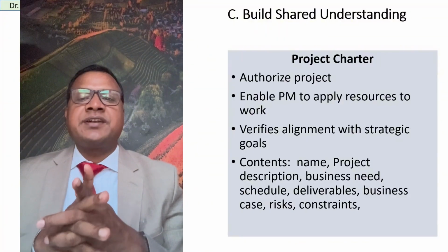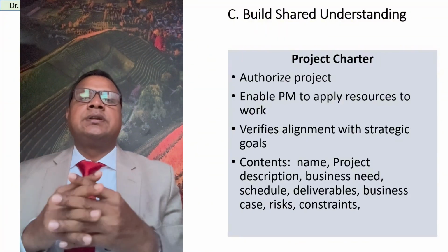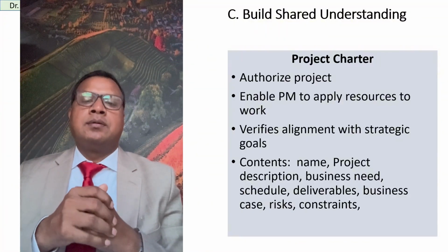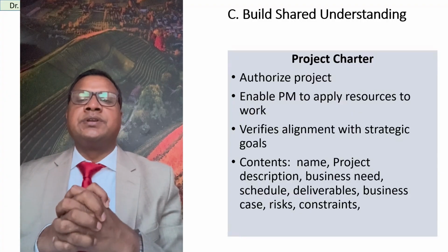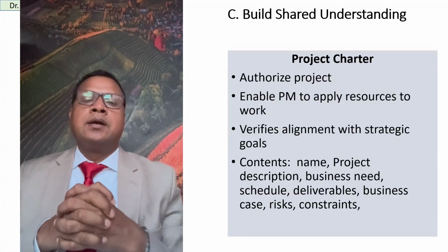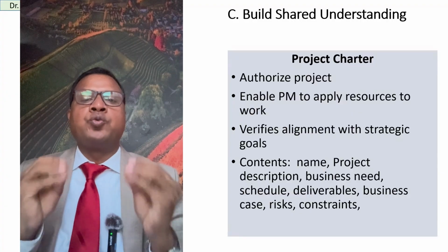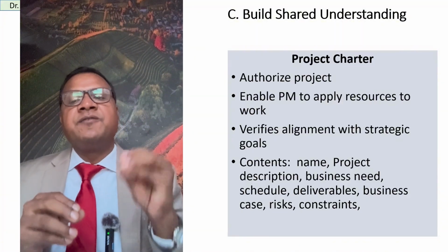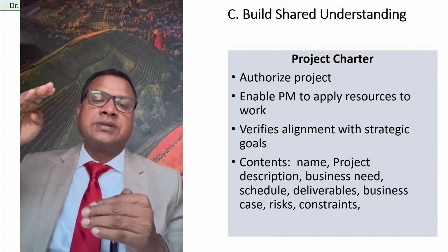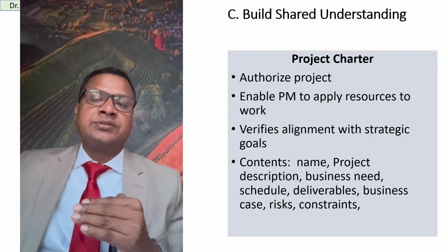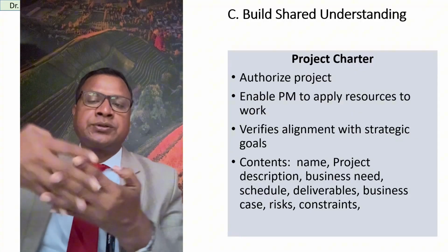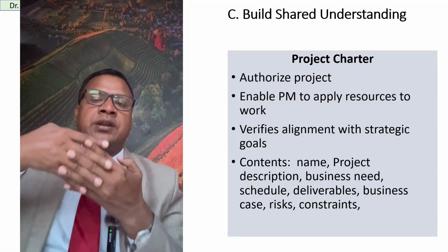And what is a project charter? The project charter should be authorized by the approval of the proper authority, and it enables the project manager to apply resources to work. And it verifies alignment with the strategic goals. So a project has strategic goals. The project charter is the connection to the strategic goals.